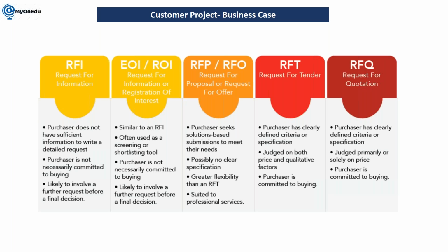In some cases, if the customer is not clear exactly what they are looking for as itemized objects or itemized steps, they can directly ask for the complete product. Let's say we are looking for a 133 kV substation. We don't know what you need inside this 133 kV substation. Or let's say we are just looking to construct one nuclear reactor. We don't know which technology you are going to use, but as per the latest technology, we want your proposal. That is an example of RFP.